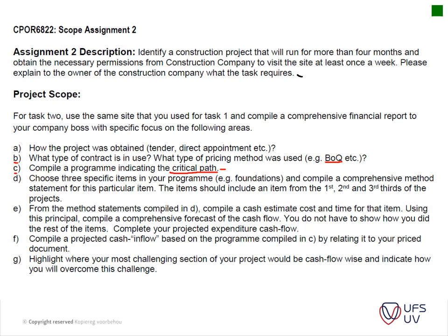Okay. Complete your projected expenditure cash flow. Okay, and then compile a projected cash inflow. When will you receive your inflow of your cash flow? By relating it to your price document.